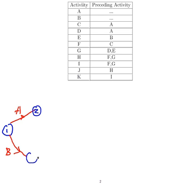So that's node 2 and node 3. Now I have activities C and D, so I'm going to look at C first. What activities depend on C? Only activity F. So what I'm going to do is set up a node here, I'm going to call it 4, and C connects nodes 2 to 4. F is going to come out of that later, so I'm going to come back to F later.